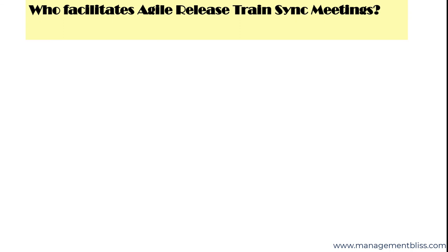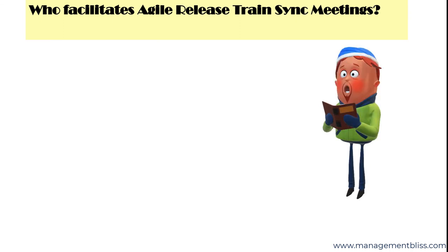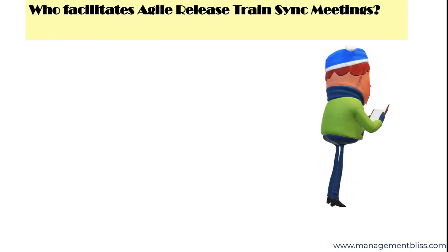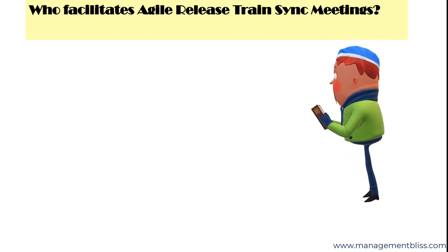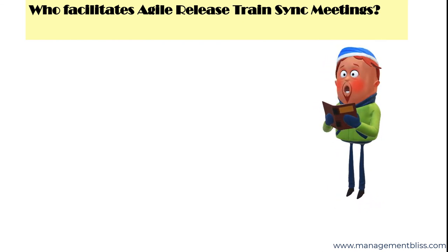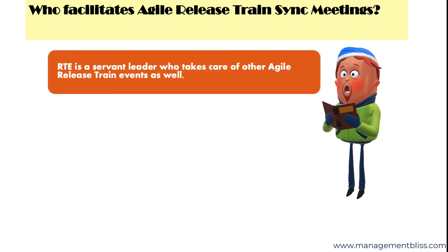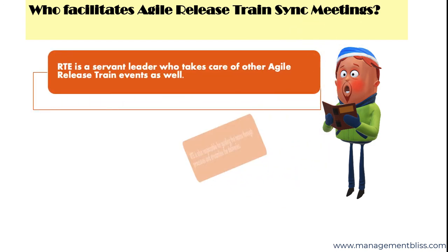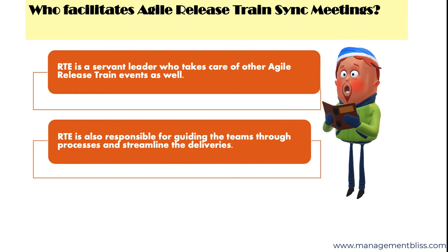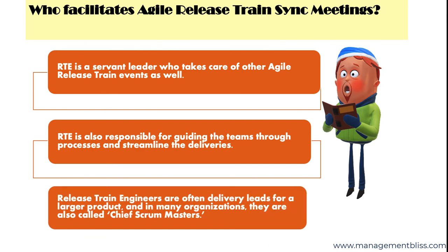Who facilitates Agile Release Train Sync meetings? The Release Train Engineer, also called RTE, is responsible for facilitating Agile Release Train synchronization meetings. RTE is the servant leader who takes care of other Agile Release Train events as well. RTE is also responsible for guiding the teams through processes and streamlining the deliveries. Release Train Engineers are often delivery leads for larger products and in many organizations, they are also called Chief Scrum Masters.